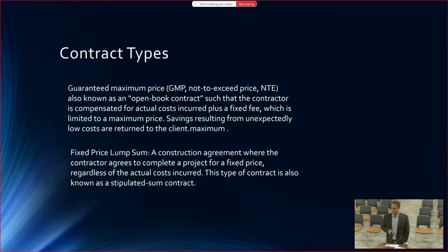And so, hey, if you can figure out a way to get this done under budget, we'll share that savings with you in some way. So it works the opposite of what I think, Chuck, you were questioning Ray Lynn on, this business about we can't do a percentage of the fee, right? The idea there is that the contractor's incentivized to increase the price of the project because it increases its fee. This pushes pressure the other direction.